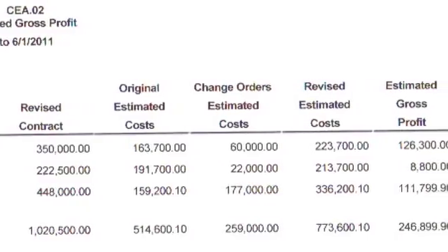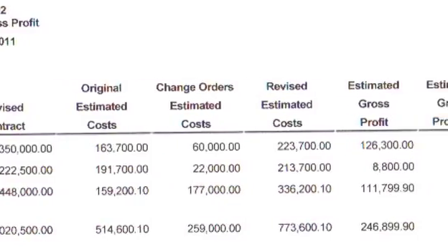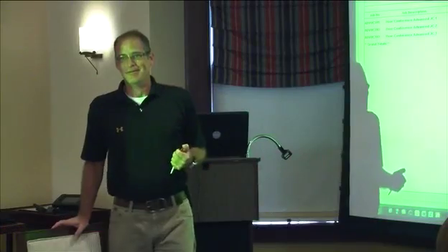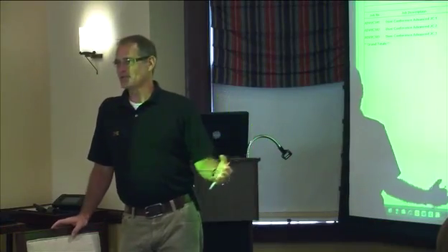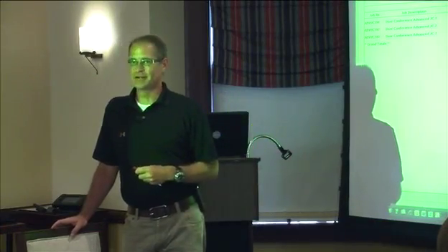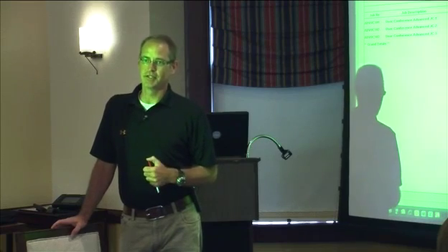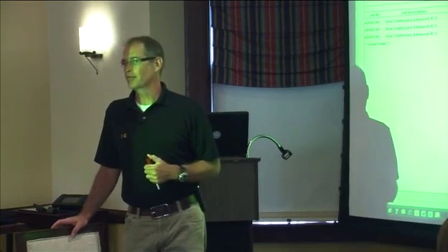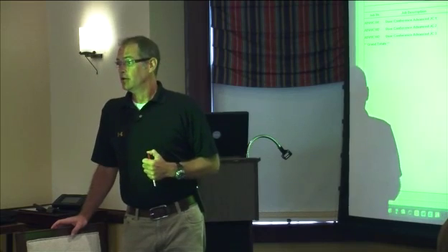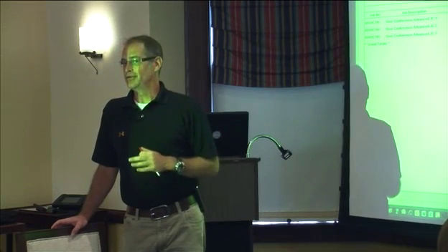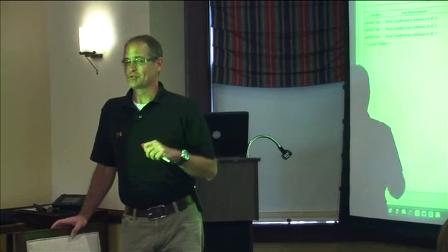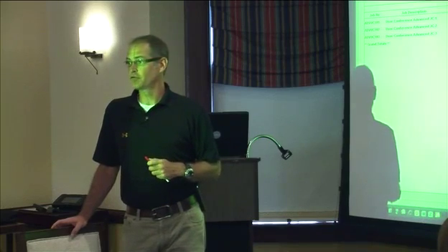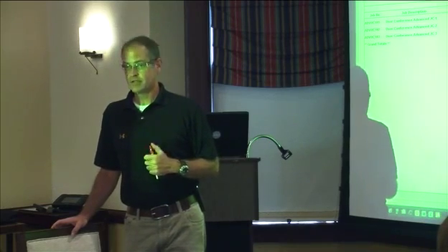What can cause this for the guys that are out there working on it? Materials expense, right? You went out and thought you bought out a job, didn't get started on the project, and the price of copper tripled, quadrupled, right? That's the other issue we're going to talk about later too, is purchase orders and making agreements for purchase prices so that you don't run into these surprises.